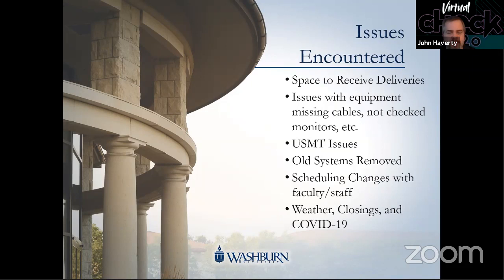This is November, December timeframe, but they were closed. We had to reschedule those, which of course pushes everything back. Have to reschedule other things. So one suggestion that I got from the installation team, when we do this again in 5 years, it'd be nice to do this over the summer. Yes, we'd be dealing maybe with rain, but it might be easier to deal with.